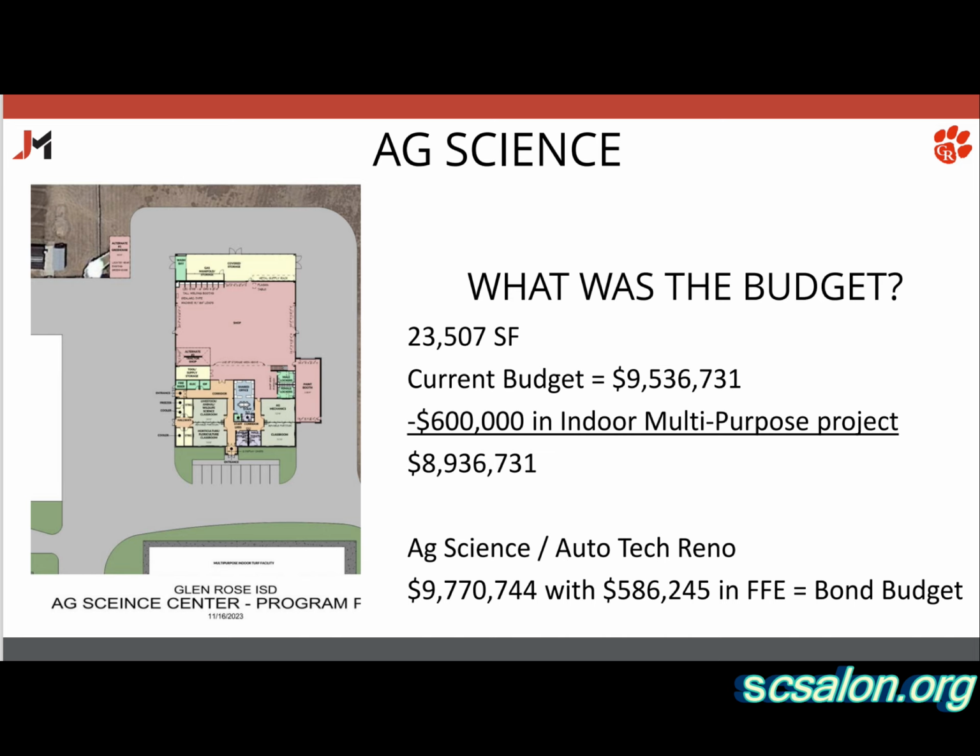I would. When they did Abilene's, they did two of those, and they returned $375,000 roughly, enough that they actually change ordered in a re-roof of another building and paid for it out of that budget. They did a roof, an old building roof collapsed, they repaired the structure, re-roofed it, and we still gave back $190,000 at the end of the day.